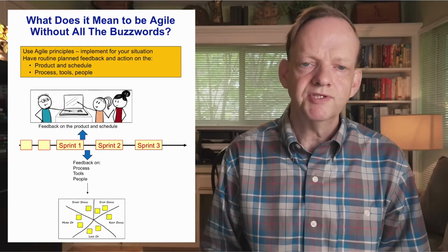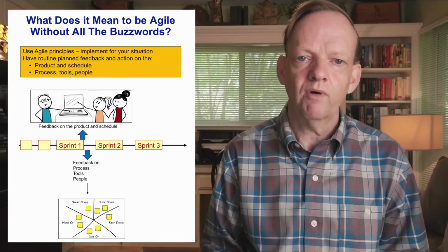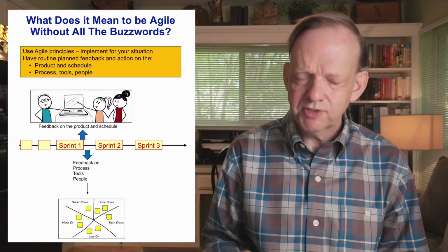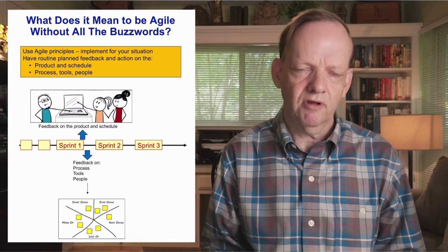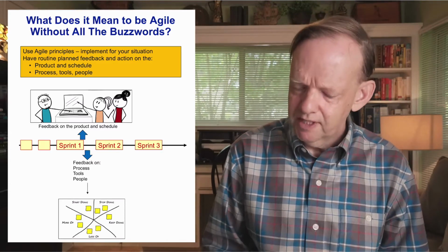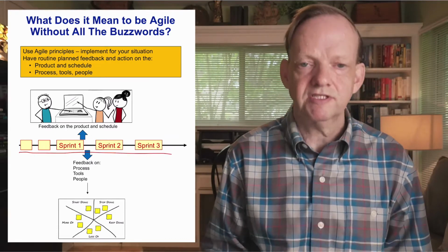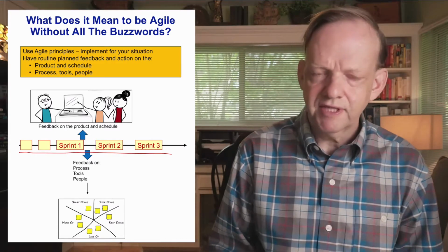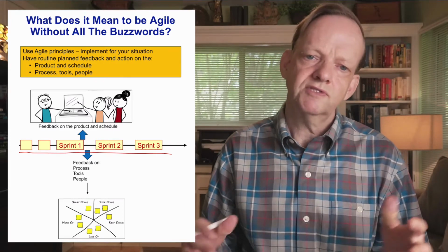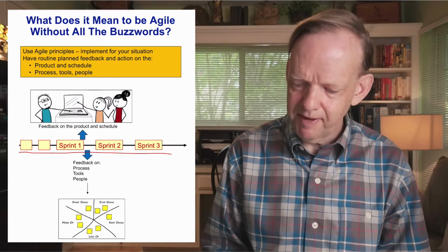Before I go into the details of a few of those examples, I want to discuss briefly what it means to be Agile without all of the buzzwords, because a lot of the methodologies in that list have a lot of key buzzwords that they like to use to describe their particular approach. So basically Agile means that you have a flow defined, for example the yellow boxes, and that there is an inspect and adapt period every 2 to 4 weeks to align yourself back with the customer, what you're building, and get lessons learned feedback to the team.